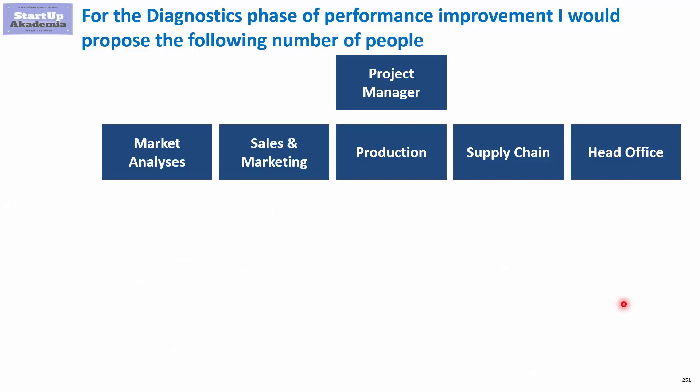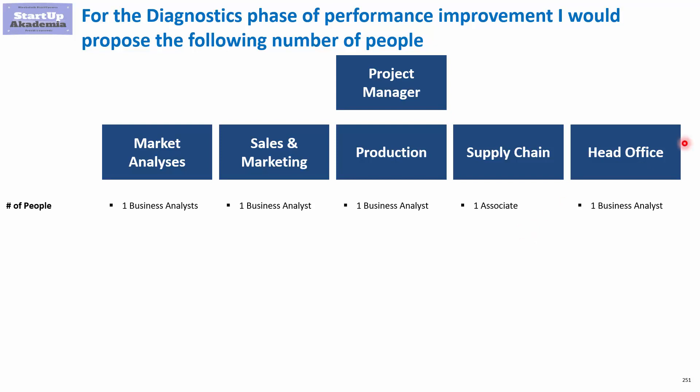In terms of the people you need: one business analyst for market analysis, one for sales and marketing, another one for production. In supply chain it would be better to put an associate — a more experienced person — and one more person for head office. So a team of five plus the project manager should suffice for most FMCG companies. The good thing about FMCG is that they in most cases have very good quality data and plenty of it.